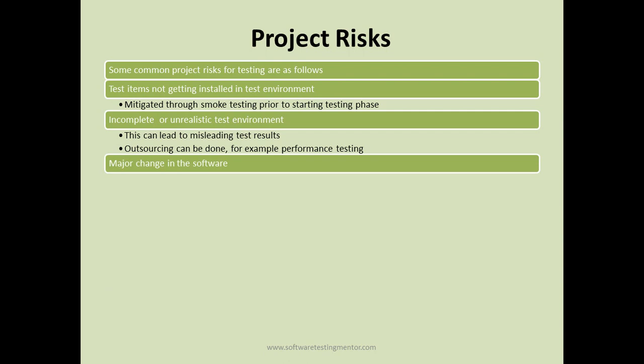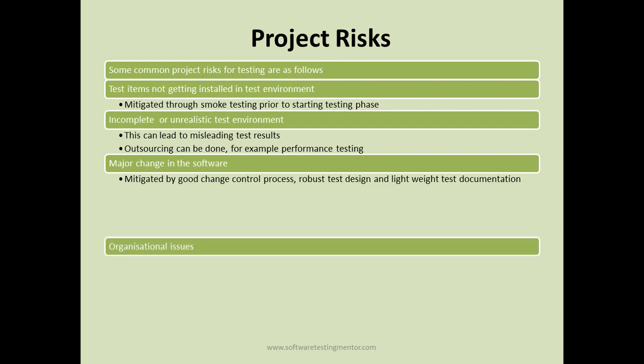Then major change in software. If there are major changes in the software which may delay the overall project schedule, this can be mitigated by a good change control process, a robust test design, and lightweight test documentation. So that's another kind of risk to the project.